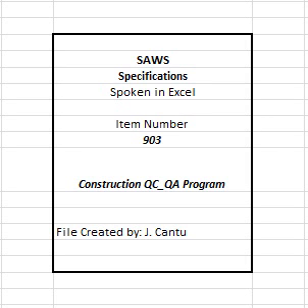903.9 Appendix. Minimum basic outline for a contractor QC plan. The following general outline shall be used by the contractor to develop a project-specific QC plan. All QC plans must comply with the overall construction QC/QA program. This QC plan must be approved by SAWS prior to the beginning of construction. 1. Pre-construction phase. A. QC organization. 1. List of personnel/chain of authority. 2. Qualifications of QC personnel, including subcontractors, suppliers, manufacturers.